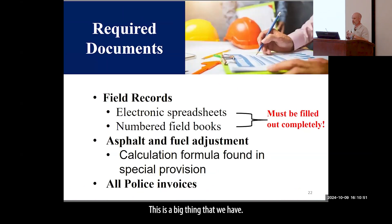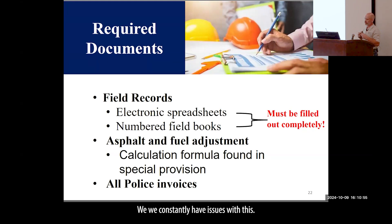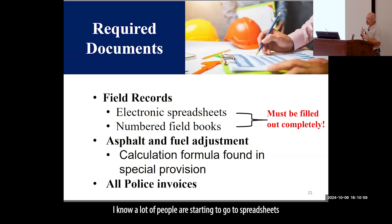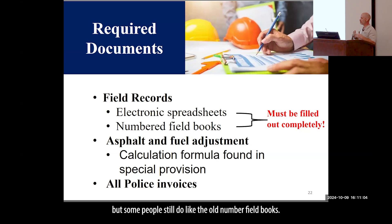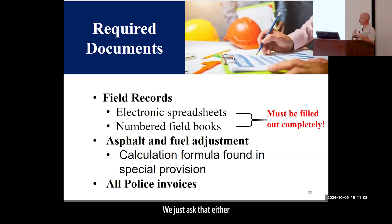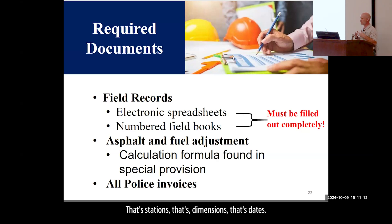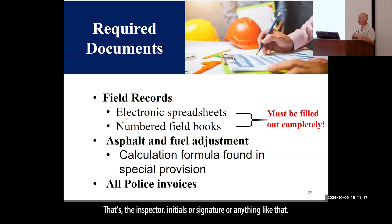Field records is a big thing we've been having a lot of issues with lately. We'll take spreadsheets — a lot of people are moving away from the old numbered field books — but whether it's field books or spreadsheets, they need to be filled out completely: stations, dimensions, dates, the inspector's initials or signature, anything like that.